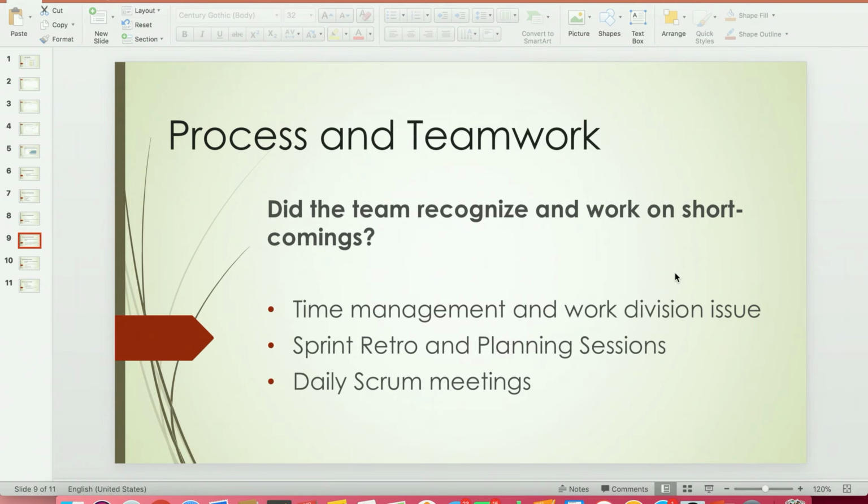We held sprint retro and planning meetings and documented the minutes of the meetings in the Git Wiki. Typically in a sprint retro, we reviewed backlogs from the previous sprints, talked about what we could have done better and how we could improve, and also appreciated any good work that was done during the sprint. In sprint planning, we divided the work for the current sprint, whose progress we would track every day in Scrum meetings, either in person or on Slack.